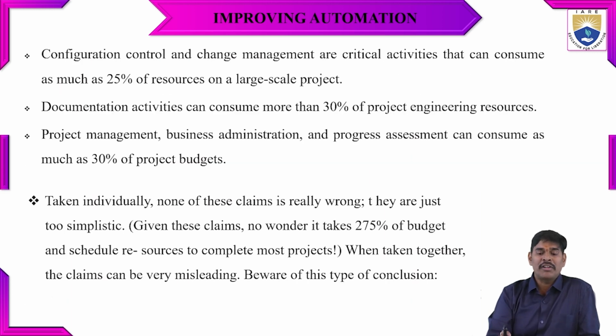And when you are taking configuration control and change management, it is very critical, consuming 25% of the resources on a large scale project. Documentation also uses 30% of the project engineering resources. Whereas project management, business administration and progress assessment can consume 30% of the project budget.